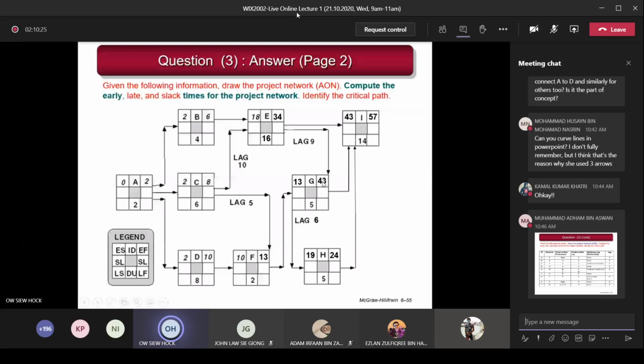Backward, you always take the smallest. After minusing the lag, you take the smallest when you come to the burst activity. Okay now? Thank you, Doctor. Welcome. Any more questions? Anyone who doesn't understand, you better ask. It is a bit complicated with the lags.